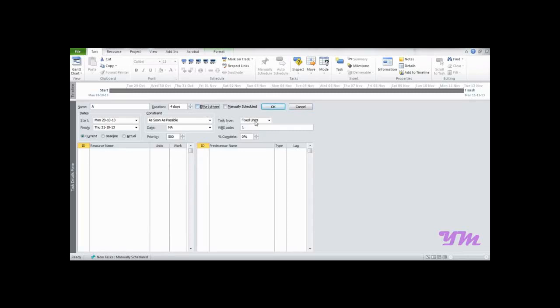And the third very important point is task type should always be fixed to fixed duration, because when we do any other function such as labeling or anything, or we play with some function with resources, it will alter the duration of the task, which we don't want. So always select fixed duration in this case. Now to the task A, we want to assign the resource R and the unit is say 9. So doing this much, press OK and next.